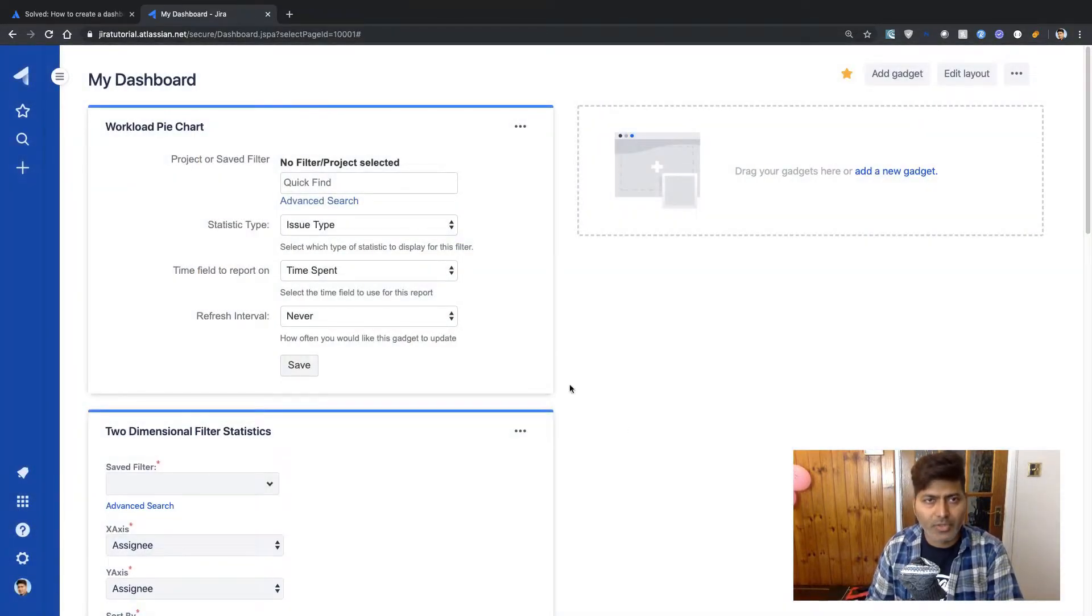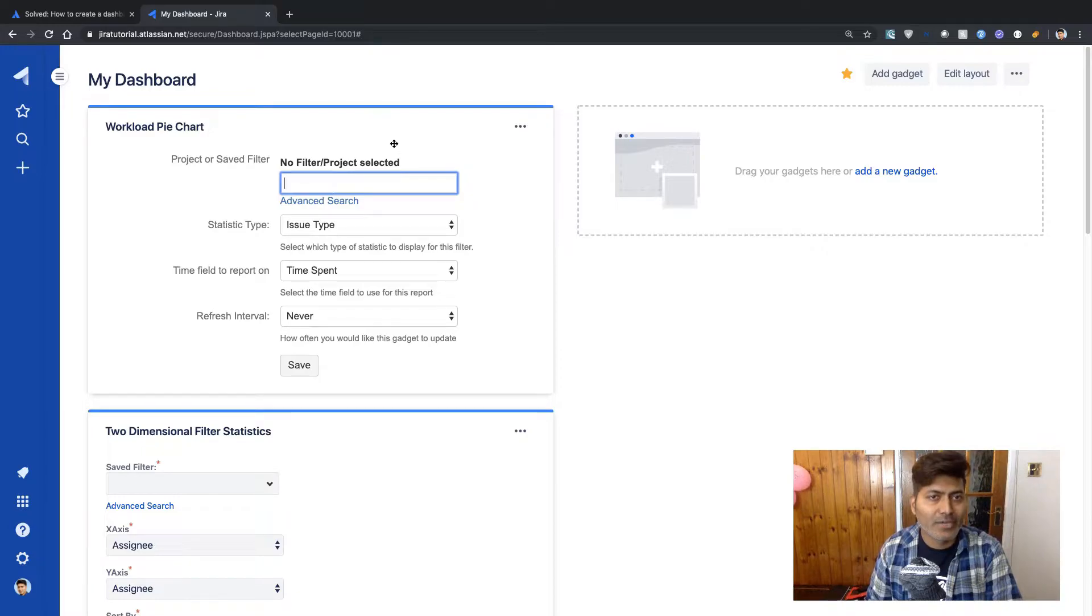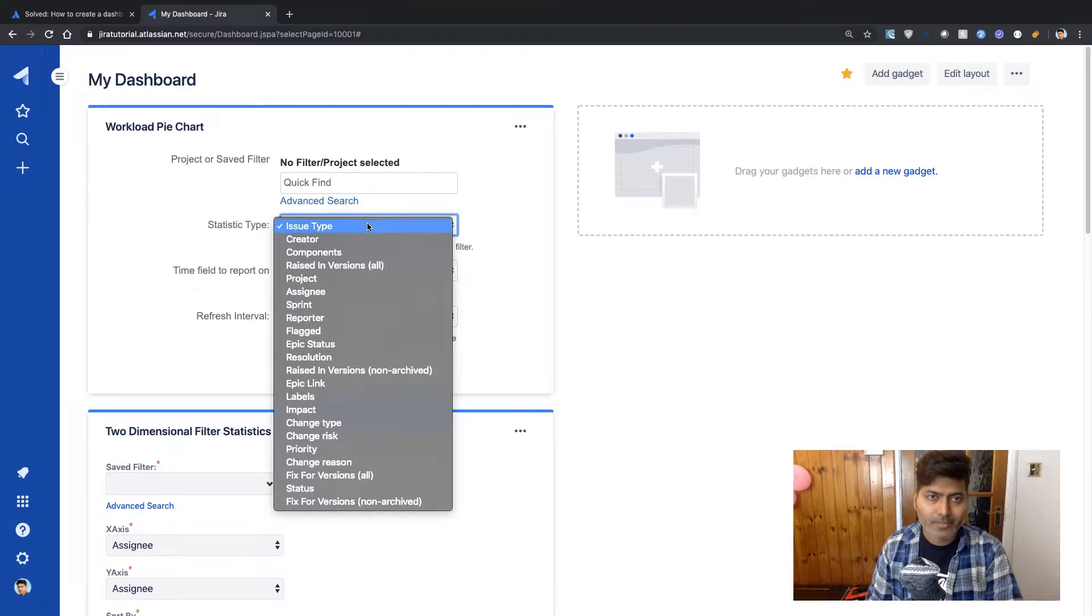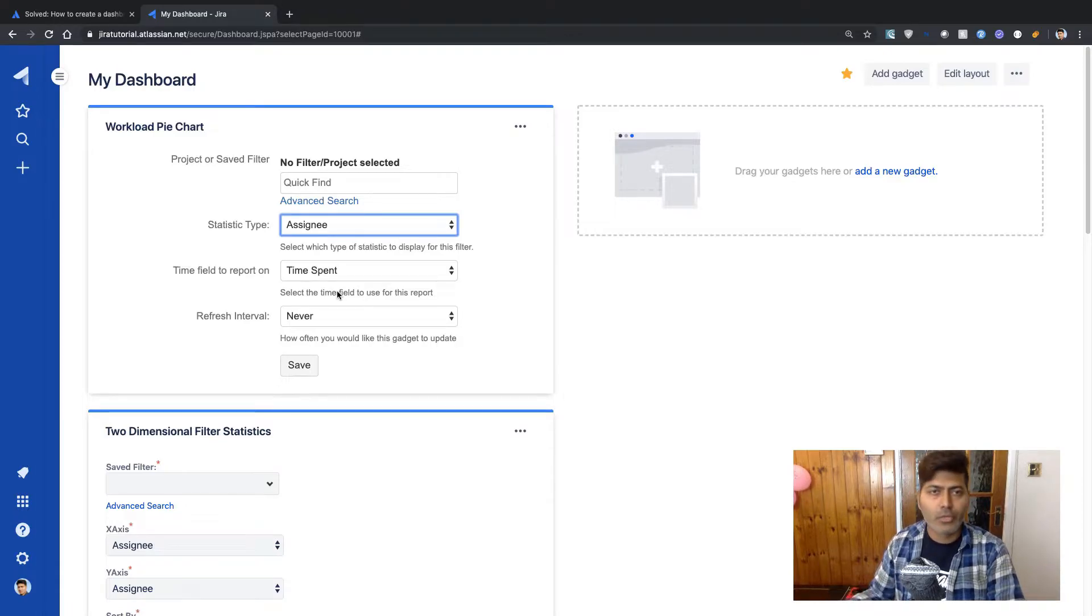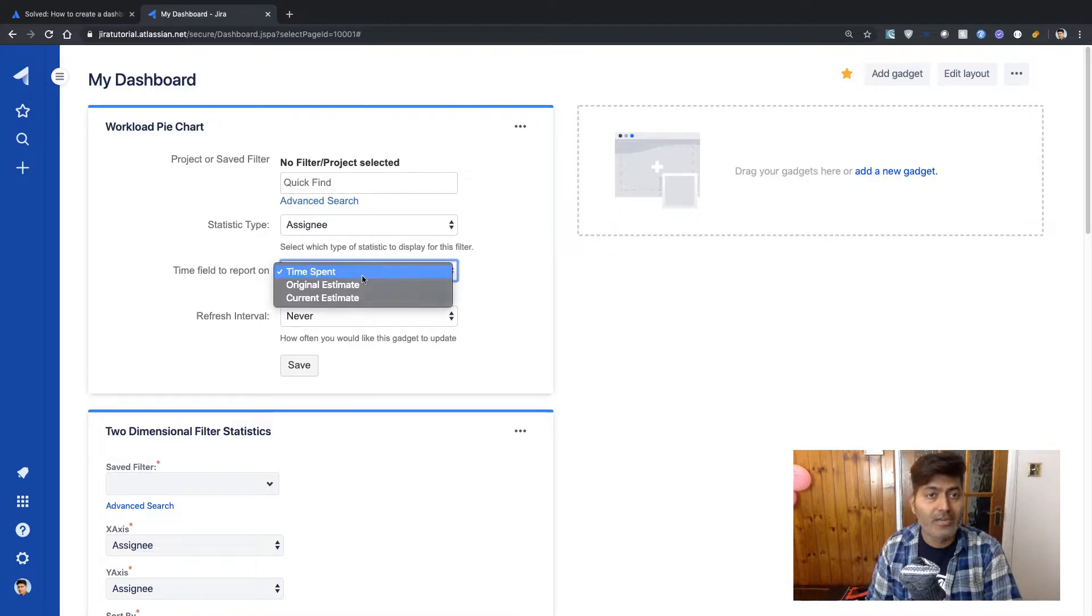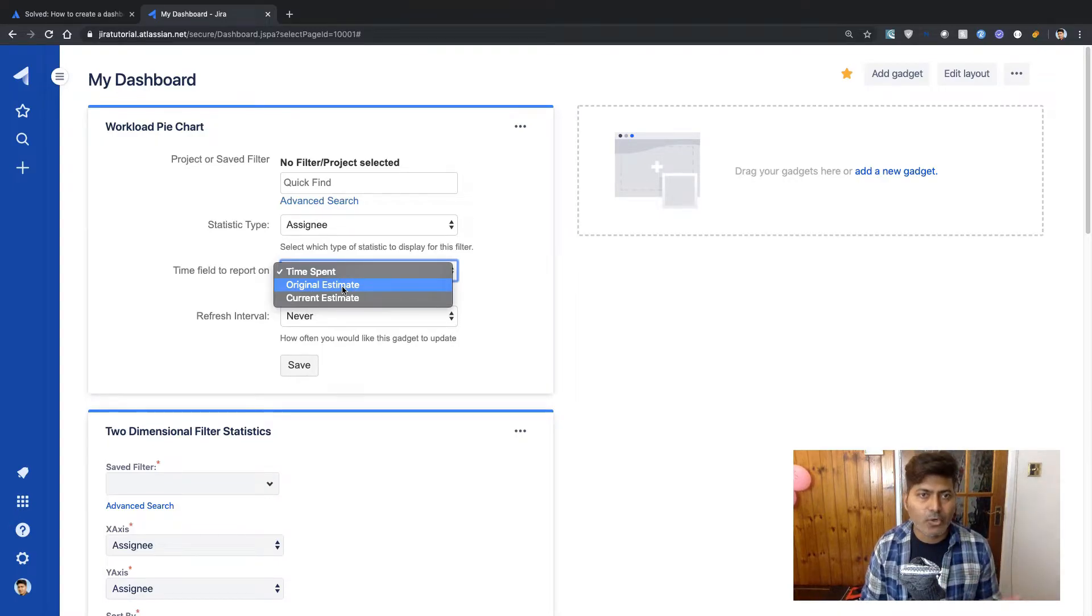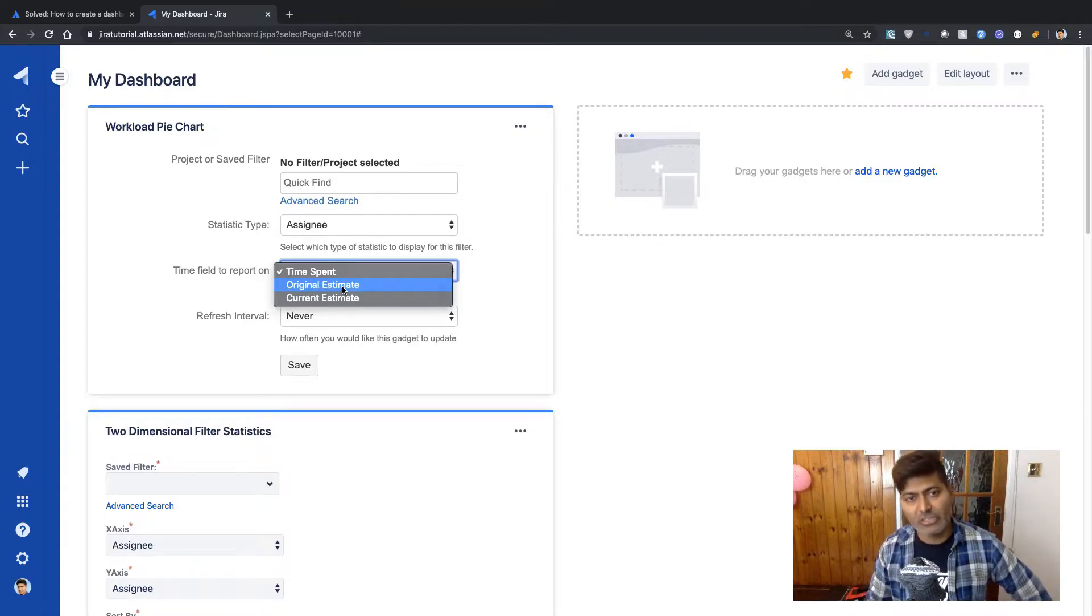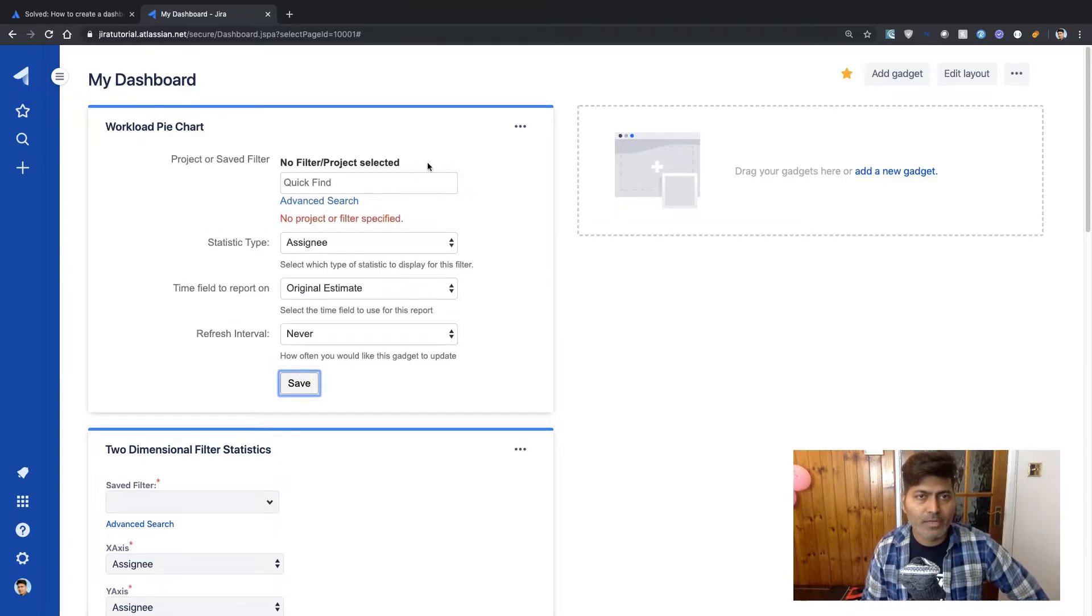Do we have anything else here? We can also take a look at the workload pie chart, but we're not really sure whether this will give us some information because you may have some time logging, but not all the issues. But let us start using it. So let us first configure the workload pie chart and what you can do here. You can actually use a statistic type here, which is nothing but the assignee because we want to use this report based on the person who is supposed to work on those issues.